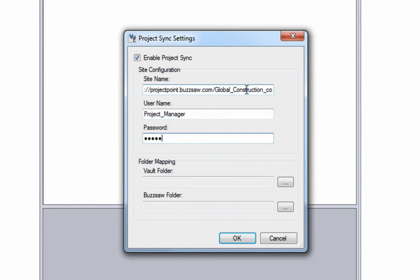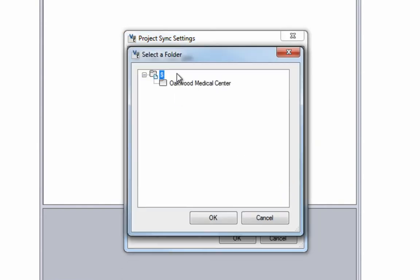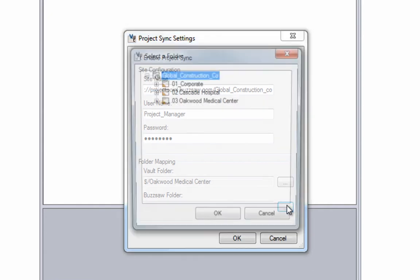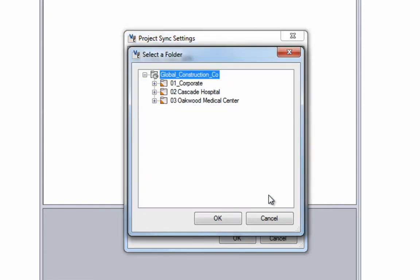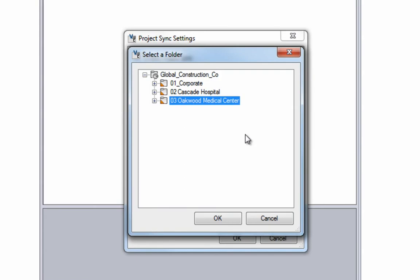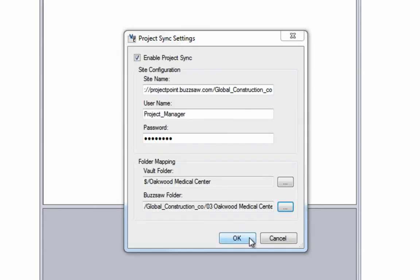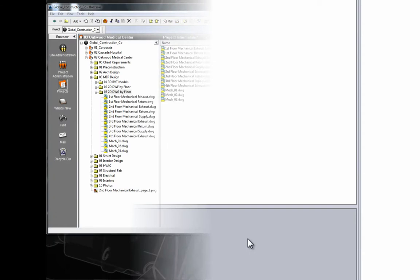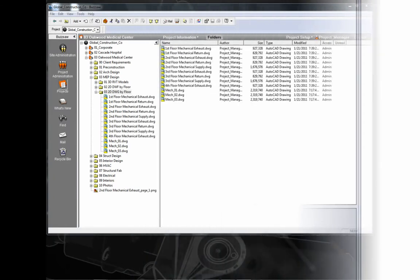The BIM Manager configures the workflow so that the latest version of each Revit model, DWG, and DWF file is synchronized between Vault and Buzzsaw on a daily basis, ensuring that all project team members have access to the most current models and data.